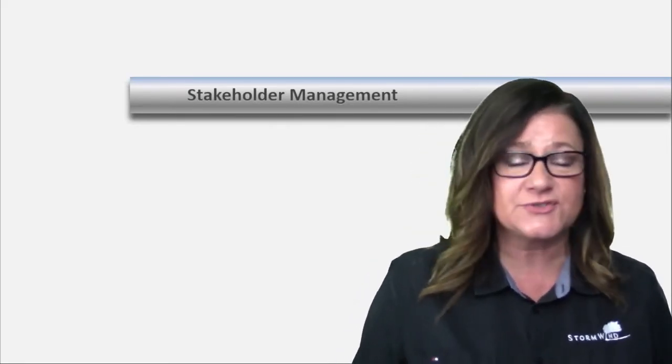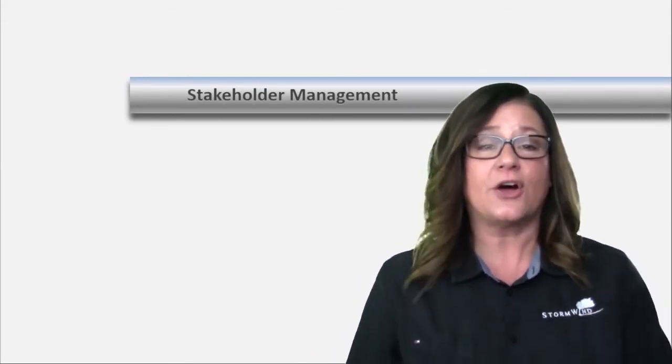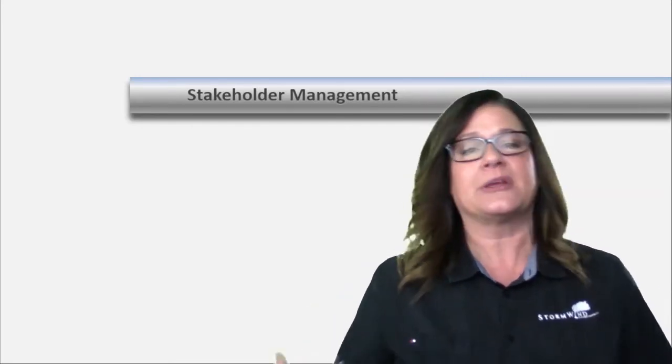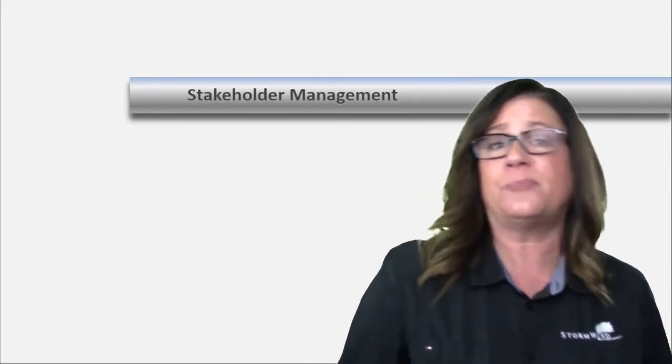It's about identifying your stakeholders' wants, interests, and needs, and making sure that we're trying to meet expectations. Does that happen from good communication? Absolutely. But does it also happen from building a stakeholder engagement plan that allows us to craft a relationship building plan for our stakeholders dependent upon their levels of power and interest in the project and their day-to-day? Using good communication is a way to do that.